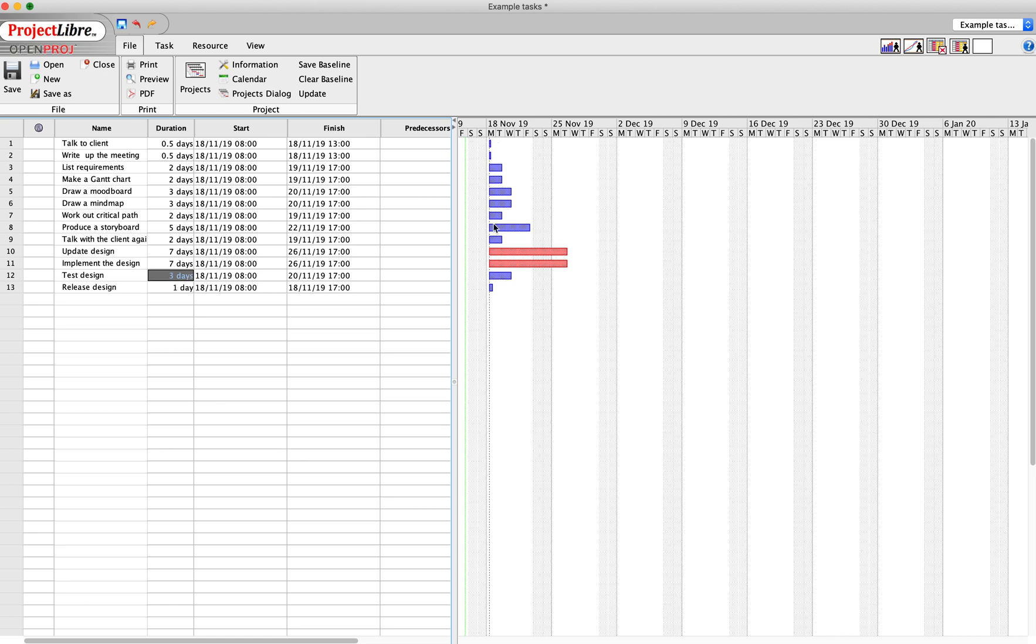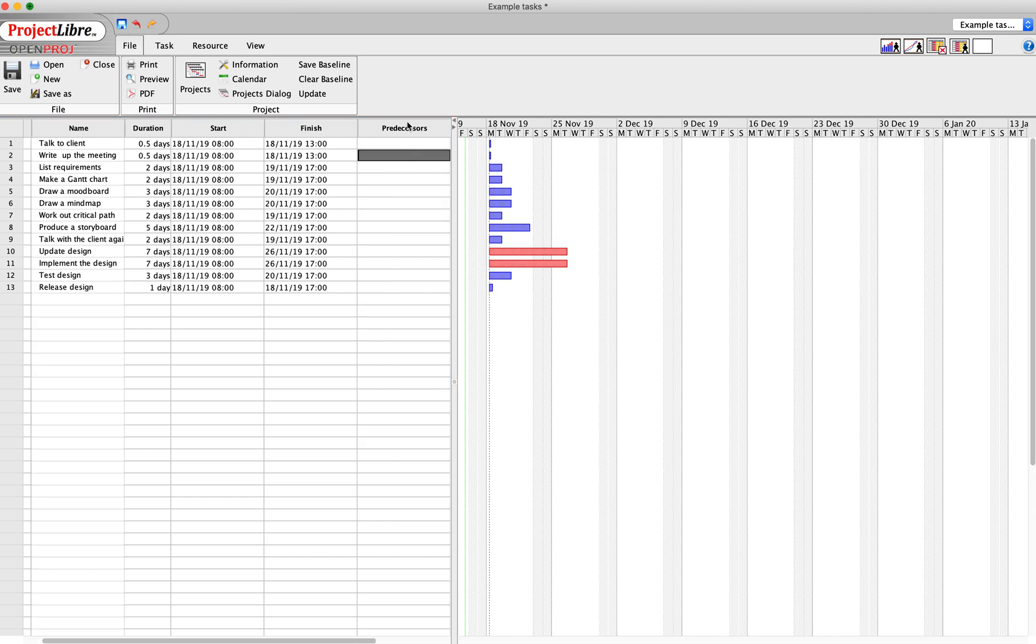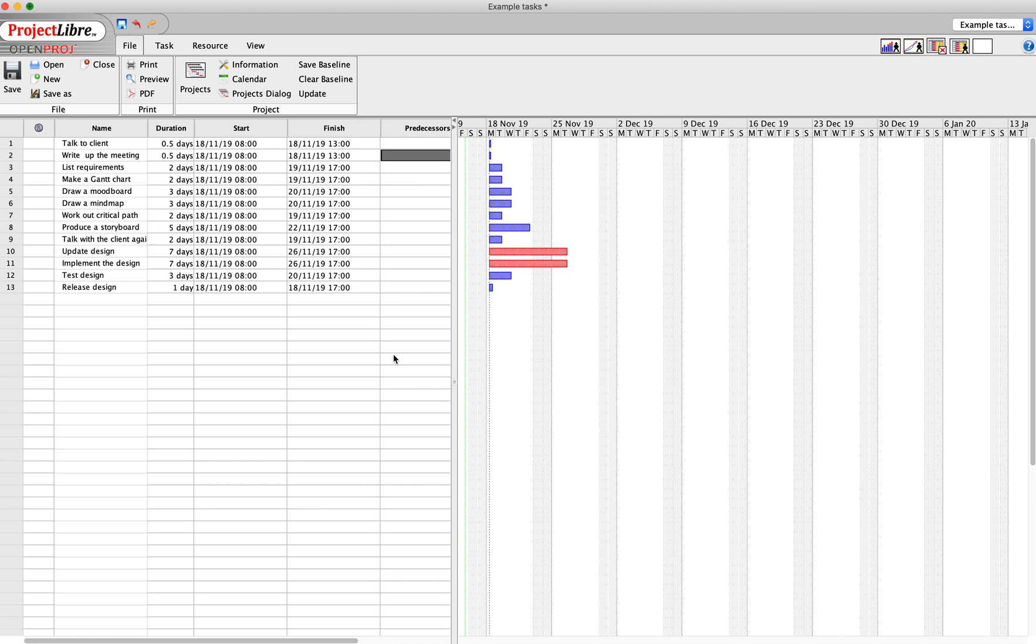So those are all my tasks, and as you can see at the minute I'm claiming you can do them all at the same time, which is untrue. So that's where you edit the predecessors, which is the same as dependent tasks.